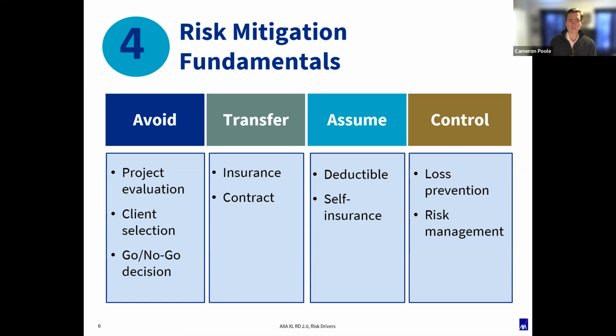And so at the heart of it, the contract negotiation is a risk transfer discussion, a risk allocation discussion, where you want to have the risk allocated to the appropriate parties, like job site means and methods. That's a risk that should be with the contractor. That is not something that should be with the architect. That should be addressed in the contract.